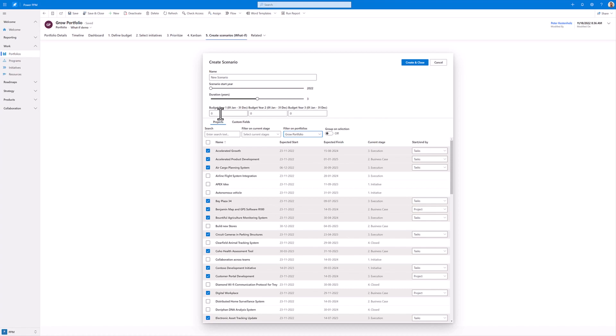And then I'm going to allocate a budget for each year. So 5 million for the current year, 25 million for the next year, and 10 million for year 3, because we don't want to over-allocate that far into the future.